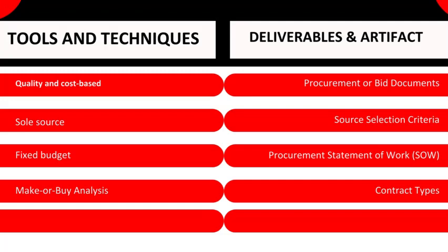The team leader considers the following factors: the cost of developing the servers in-house, the cost of purchasing the servers from a cloud computing provider, the quality of the servers that can be developed in-house, the quality of the servers that can be purchased from a cloud computing provider, the time it will take to develop the servers in-house, the time it will take to purchase the servers from a cloud computing provider, the risk of developing the servers in-house, the risk of purchasing the servers from a cloud computing provider.